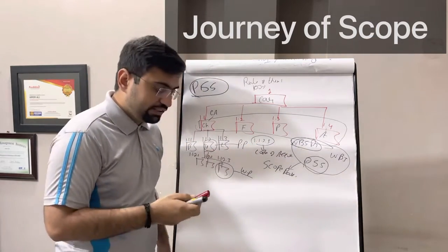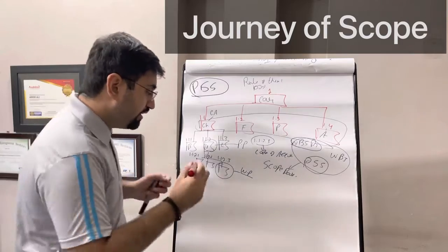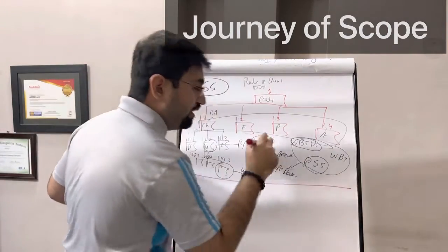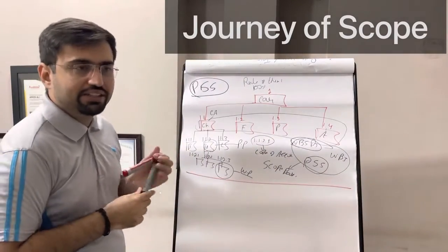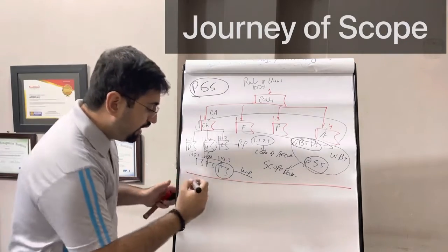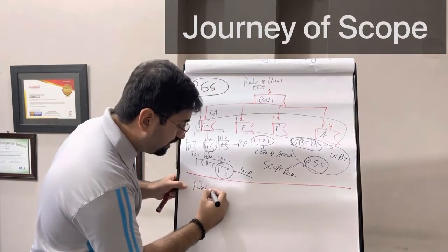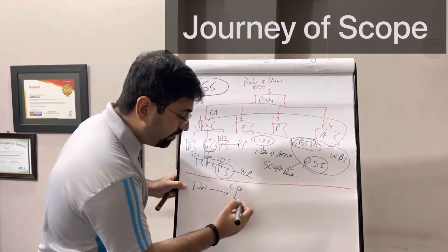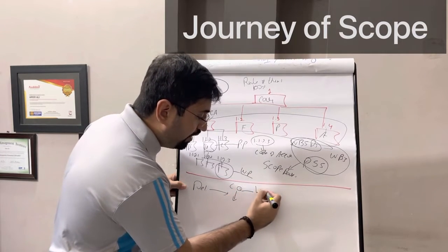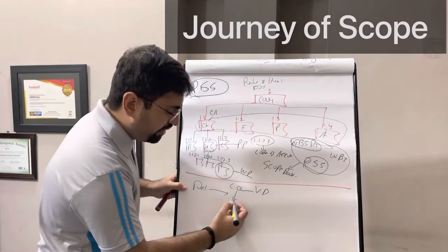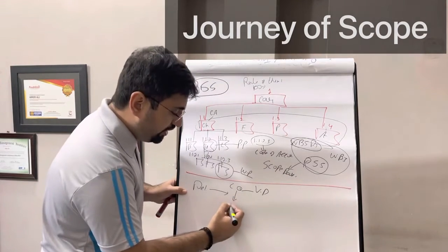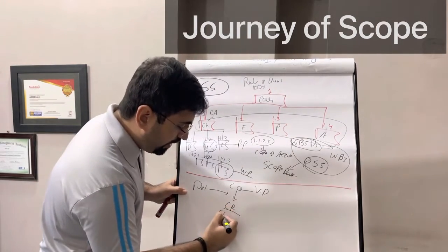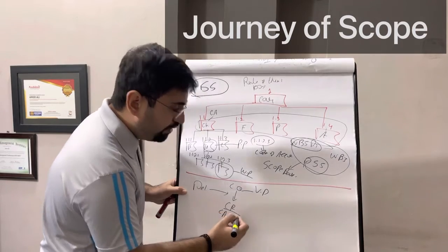One other important thing in the scope topic is basically the journey of the deliverable. The journey of the deliverable kind of ends here. We know that the deliverable produced in execution goes to control quality, and if it is accepted, it becomes a verified deliverable. If it is rejected, it becomes more of a change request. You need to do corrective action, preventive action, defect repair.